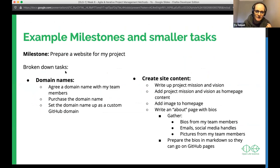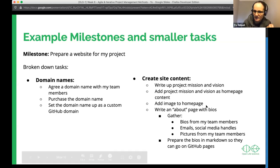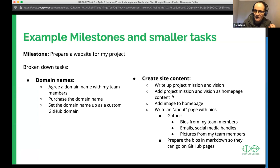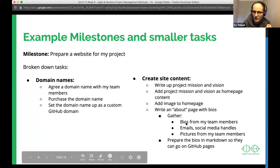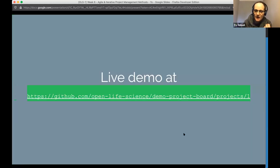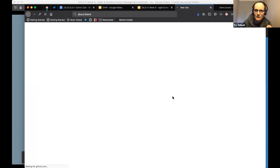For a website milestone, I've broken it into two tasks: 'domain names' and 'create content.' Domain names breaks into: agree on a name with team members, purchase it, and set it up on GitHub. Content creation breaks into writing an About page, which itself breaks into gathering bios, emails, and pictures. Each time a task looks too large, break it down further until each piece has a clear, estimable scope.